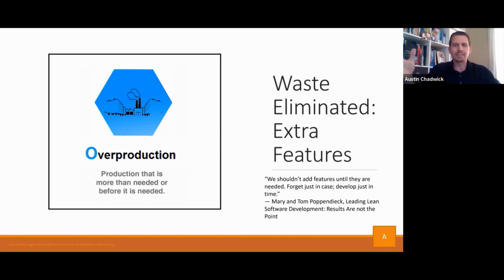Because what was being observed in these systems was that you would do, let's say, 100 requirements, and only 20 of them were really being used and providing a lot of value. The other 80% was hardly being used or not being used at all, right? And so that's a lot of waste of overproduction. When the team started mobbing, they noticed a lot of this overproduction went away because the lean thinking people on the team would prevent it. They would just talk to the product owner or the customer, find out what's needed, and then deliver that right away and move on to the next thing. And so a lot of this extra excess was no longer there.